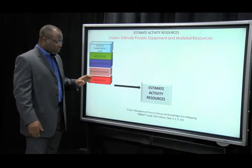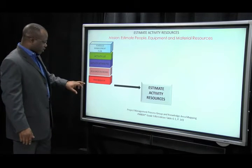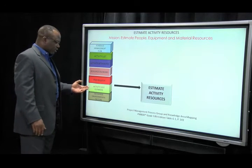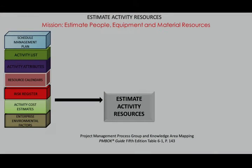This is business as usual. If you're taking the PMP or CAPM exam, you'll see quite a lot. We've got activity cost estimates — this comes from cost, so don't think it's strange. These are estimates for resources carrying out work, and they need to be considered. If you use a more skilled resource than Phil, you'll pay more money — but is that what you want? Would you prefer to use more of Phil's time and pay less, or get it done quicker and pay more to get someone else? All these considerations need to be made when you're estimating activity resources.